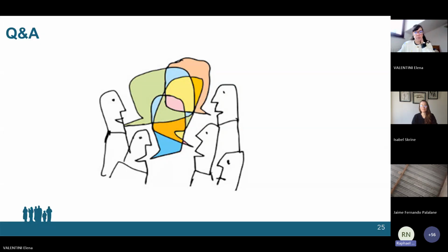So for us, as a recommendation, when planning a resource center or a community center, it is important to identify an already existing governance structure or community structure where we can have an agreement with the community or with the host government to utilize the center for community coordination, so that the transition and handover will be easy for us when pulling out. It makes it easy for whatever we have going to continue, and the community can access the space.